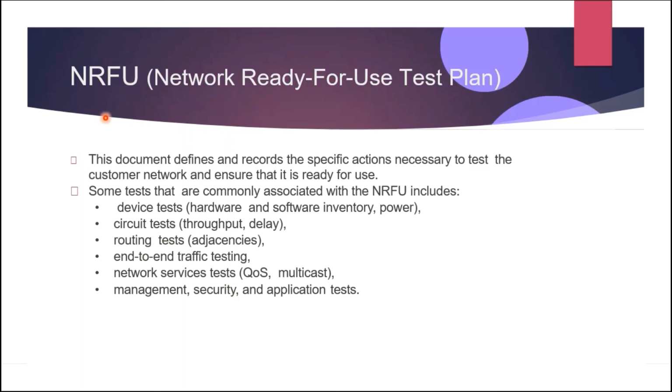NRFU, or Network Ready for Use Test Plan. So a Network Ready for Use, or the NRFU, is performed on a new greenfield network infrastructure as a last step in certifying that it is ready to carry production traffic. So during the NRFU test, network devices are methodically checked to ensure that they have been implemented according to the design specifications and are running in an error-free state.